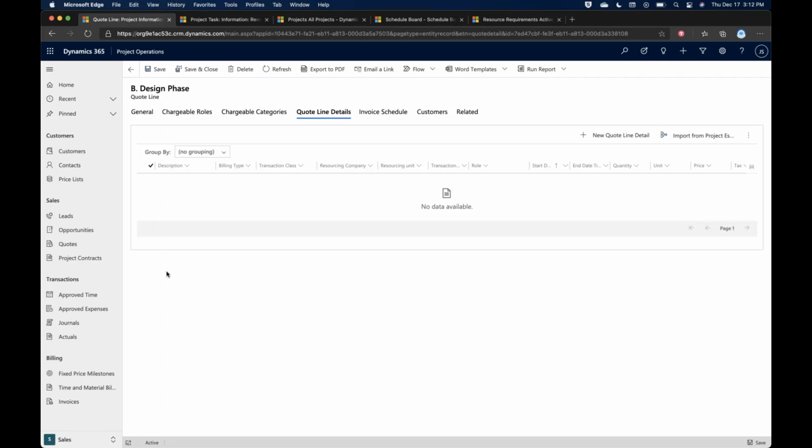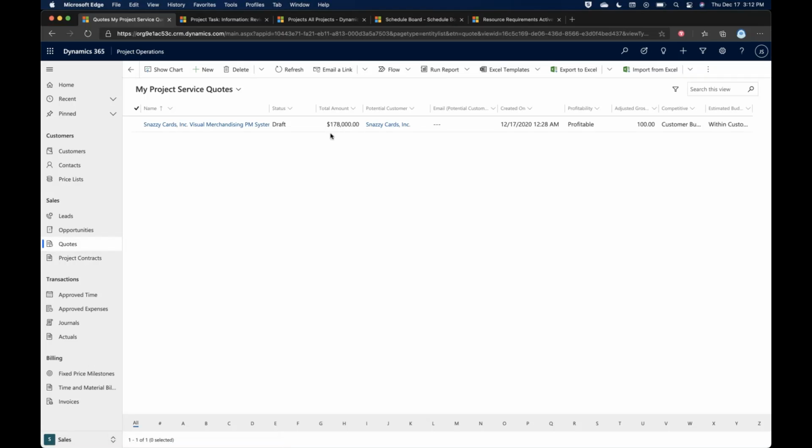Okay, so that's a little bit of a quick overview of how we can do a rolled up estimate. Once we have actually been working on our delivery of our project, we'll start to also have time to approve and expenses to approve. Once we approve time and expenses, then that information can be marked as ready to invoice. We're not going to go into a lot of details about that today, and we can definitely cover that at a different time, but when we approve any time or approve expenses, this allows us to engage with any workflow processes that we want to set up.